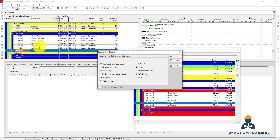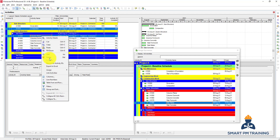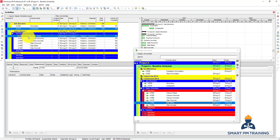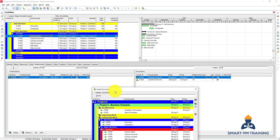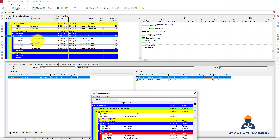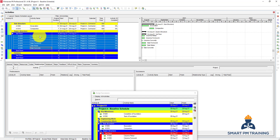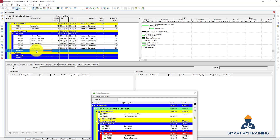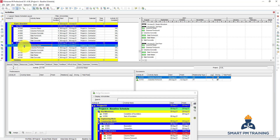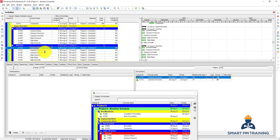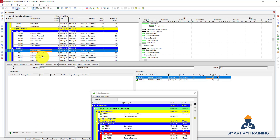Because there are intermediate links among these activities, it will copy those, but it will not copy any external activity relationships. For example, if I link compaction to rebar - which is of course a wrong relationship - when I copy all these activities it will not copy the relationship between compaction and columns-rebar. It will only copy the internal relationships among the selected activities. Click Copy, go to the second floor, click Paste - yes, copy everything. You can see the relationship with compaction did not exist but all other internal links were copied.